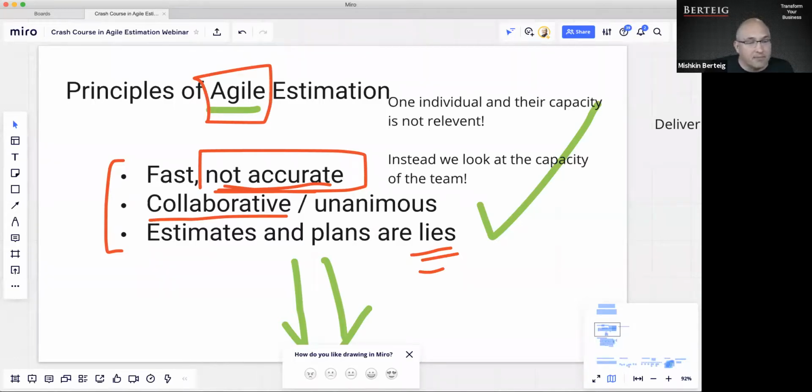Okay, more questions. If the story points are estimated on the product backlog, is it required to re-estimate during every sprint planning? No, it's not required to re-estimate. However, the team may choose to re-estimate. Once in a while, they will realize some of their estimates are really bad. Often our estimates are bad, so we shouldn't worry about it too much. But sometimes our estimates are really bad. And when that happens, yes, the team is welcome to re-estimate, but it doesn't necessarily happen every single sprint.